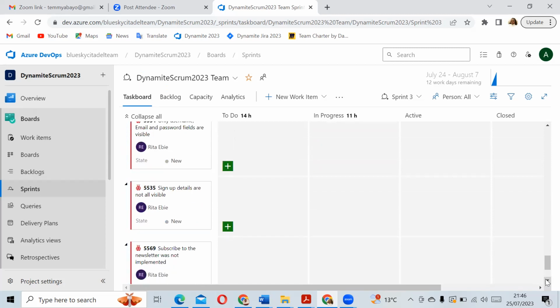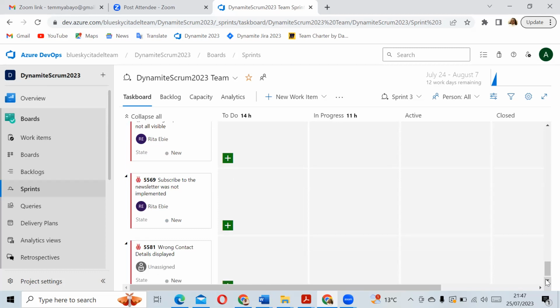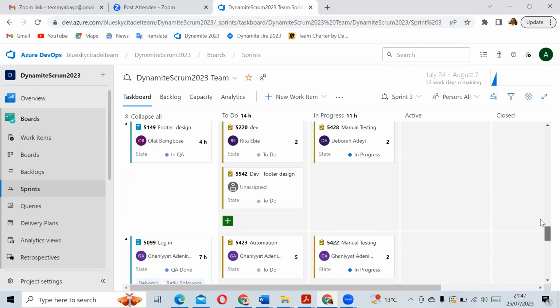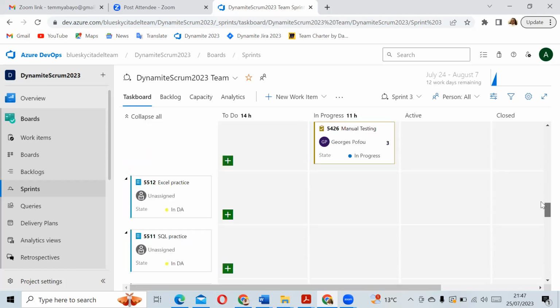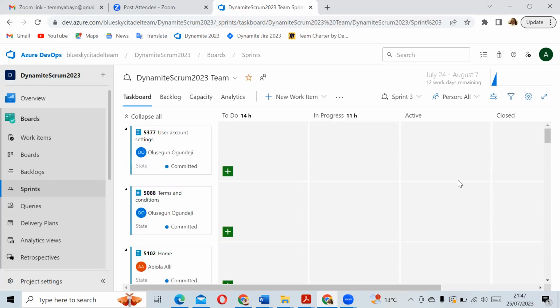And there are some bugs that have their own life cycle. Normally any bugs you raise on a particular story, maybe when the QAs are testing that story, might not have a life cycle of their own, as they're not independent, because they're dependent on that story.